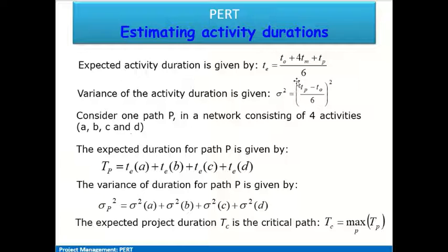So if we take a particular path, based on the network diagram where we construct the different activities and their relationships and show them diagrammatically, then from the first node till the last node we get different paths. So what we are saying is that it is assumed that the expected duration of alternative paths follow a normal distribution, and similarly the variance of the duration of the project along a path is the sum of variances of the individual activities on that particular path.